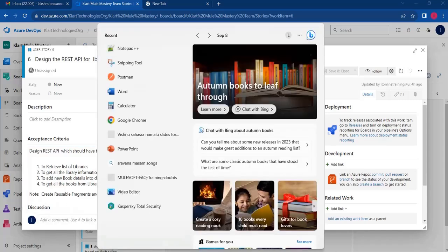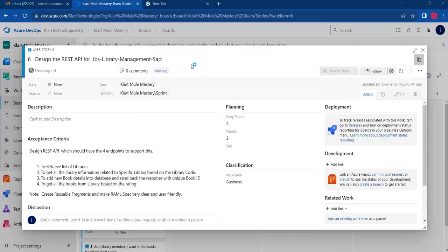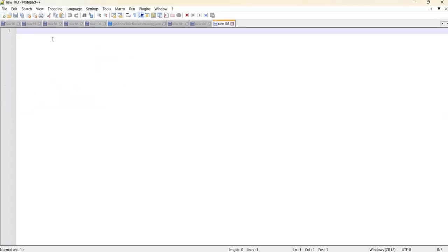This is just an example I am giving, but it may differ from organization to organization, and you need to keep that in mind. In general, one story point means 8 working hours. But a few organizations take one story point as 4 working hours.